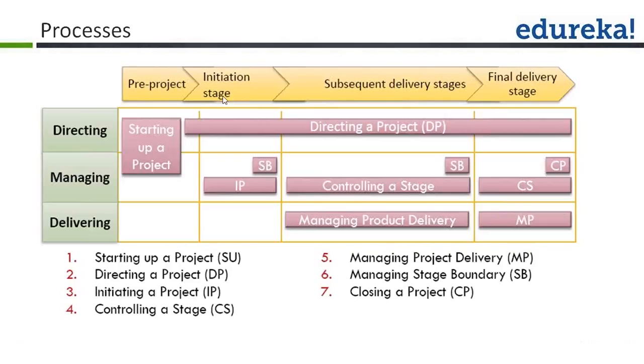Now, initiation stage, also called as planning stage. In planning stage or initiation stage, we have two processes: IP, initiating a project, and SB, which is managing a stage boundary. Now let's go through initiating a project process.